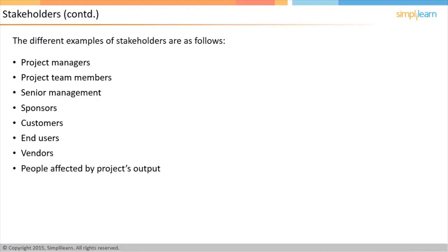For example, if a highway project requires possession of privately owned land, people whose land is being taken away are the stakeholders. If the construction of a dam or water reservoir benefits the downstream farming communities, they are the stakeholders here. Competitors who provide alternative goods or services are stakeholders too. Sometimes environmentalists or other social groups may become stakeholders. The government or political leadership may become stakeholders for projects in the public domain.